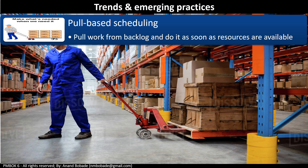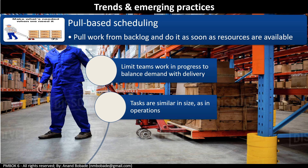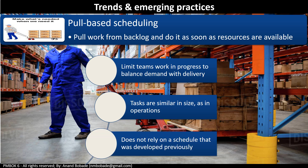Pull-based scheduling is used in lean manufacturing. Resources pull work from a backlog and work on it as soon as they are available or their previously assigned task is completed. Key points: pull-based scheduling doesn't rely on a previously developed schedule, tasks are similar in size as in operations, and it limits the team's work in progress to balance demand with delivery capacity.